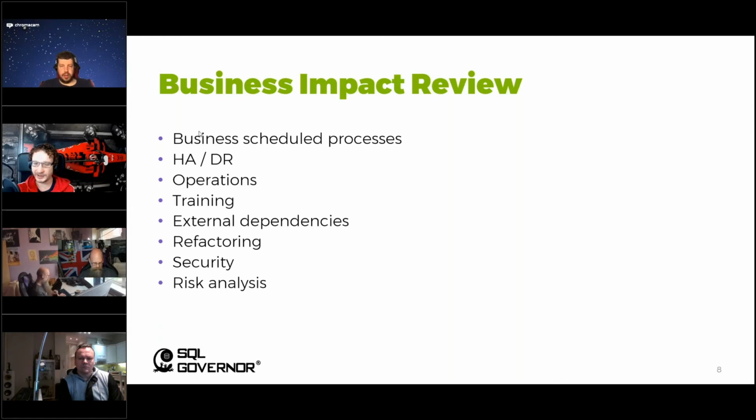And it's not something that happens quickly. You need to plan for that. You need to find the resources. You need to plan for people being away for training. You need to plan for the training itself. So you need to find the people who will deliver the training. They need to be a good resource for delivering the training. And so there's a long process that has to be set up initially to let this run smoothly.